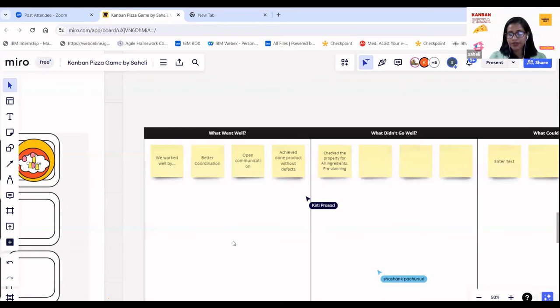So the last one is control delivery through the policies. Policy here does not mean any hard and fast policy. If you remember, when we were doing the retrospective, you yourself built some policies, right? In the next round itself, we said we will set our WIP limit to 3. We will set this as 2.